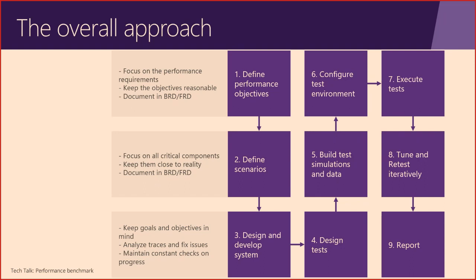You're going to focus on their objectives, what is important for them in terms of processes, what would be the objective in terms of performance, so the duration of the process, the maximum response time of the interaction. You would list, prioritize the scenarios to then prepare them.